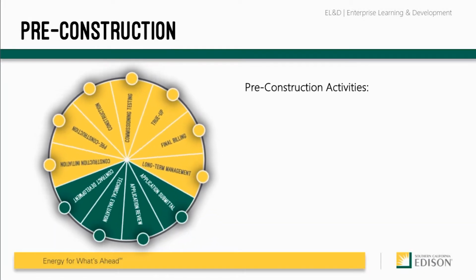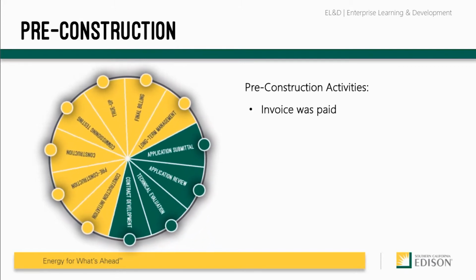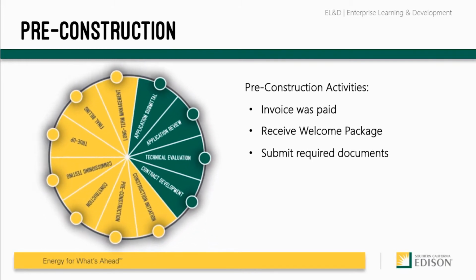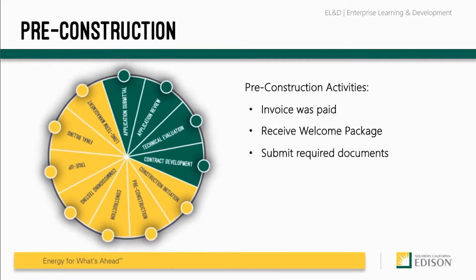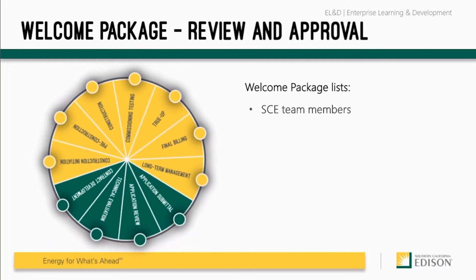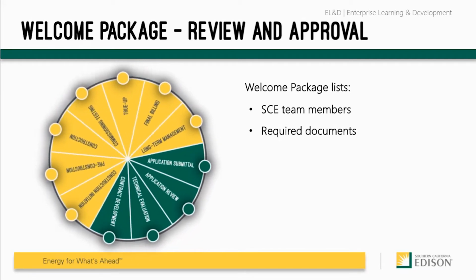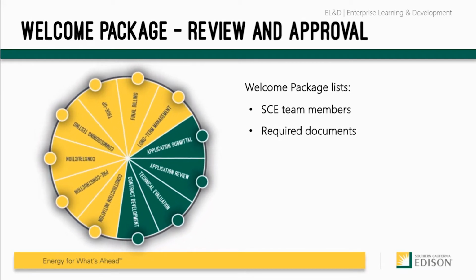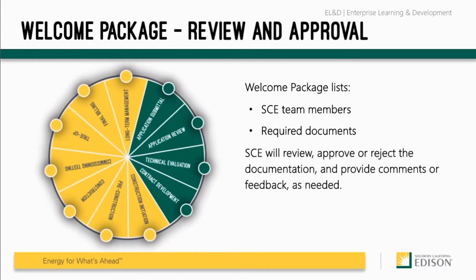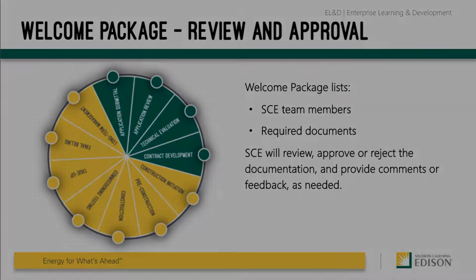Pre-construction follows the construction initiation stage after confirmation that the invoice was paid in advance of construction. You will receive a welcome package and submit the required documents to the assigned SCE team member for review and approval. You will receive a welcome package listing the SCE team members as well as documents needed from you as required by their agreement or needed to complete the project. Upon uploading the documents, SCE will review, approve or reject the documentation, and provide comments or feedback as needed.